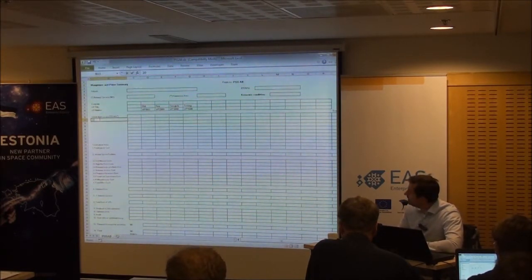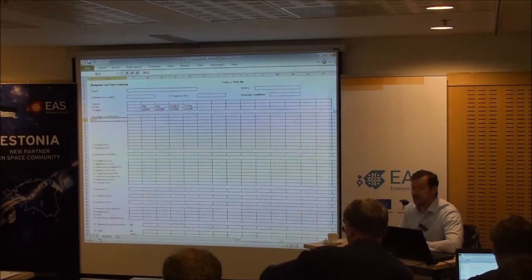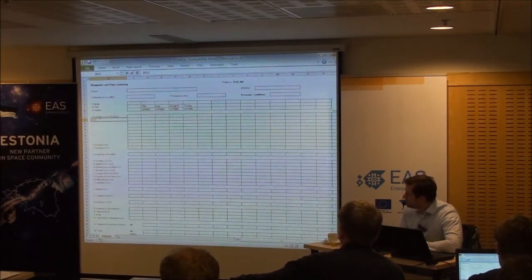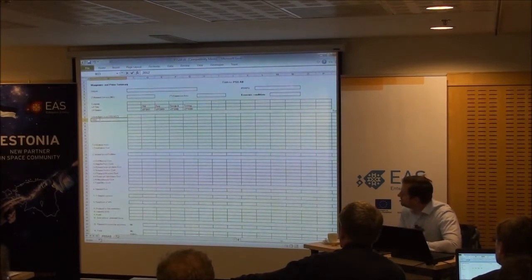So we had the 2012 category. Again, you'll have to break this down by years if the project spreads over multiple years, and apply the same inflation. So cross-check, and try and group all these spreadsheets together, so you affect one, you affect them all. Find someone in your organisation who likes to spend a nice day putting all your spreadsheets in order and make them nice and efficient for you.